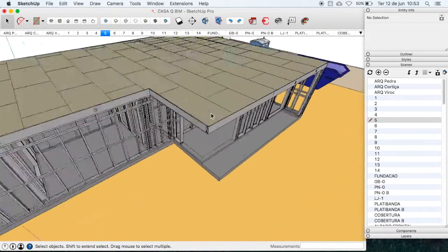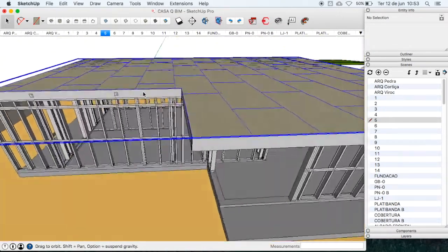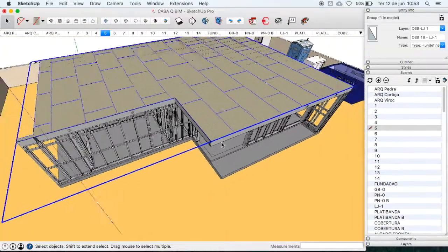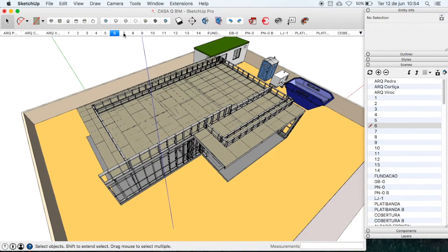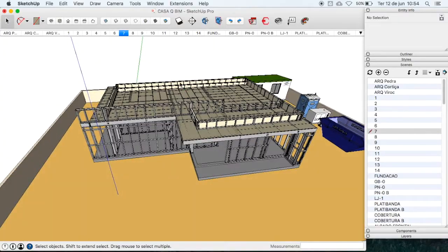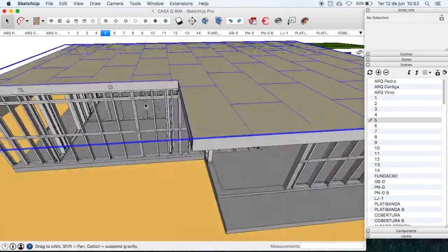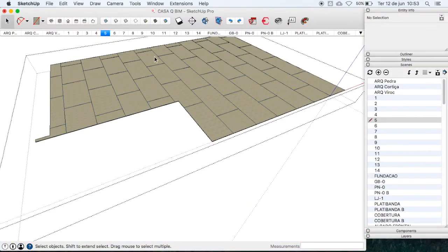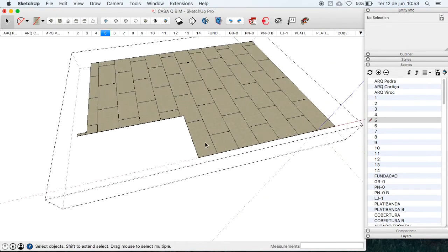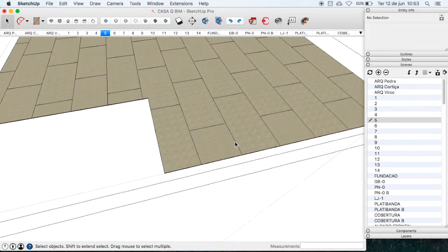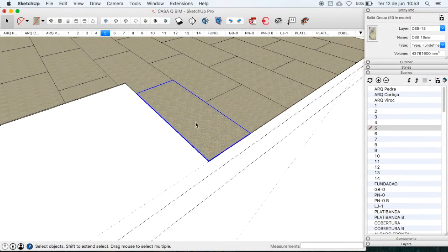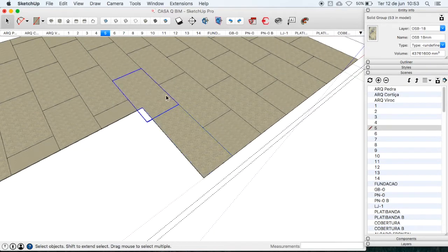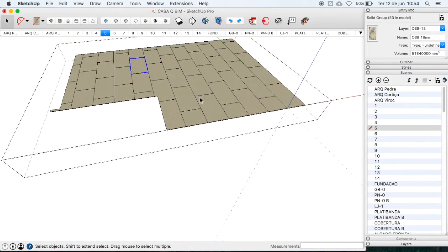The walls and slabs in OSB panels were also modeled with real dimensions, so the BIM model presents with a maximum of reality the way it will be built. The way each material is modeled depends on the BIM use the contractor wants. You can verify that each OSB panel was modeled as a single object, because in this case, in addition to the area of cladding, a cutting plan will also be made through an Excel file with the size of each panel.